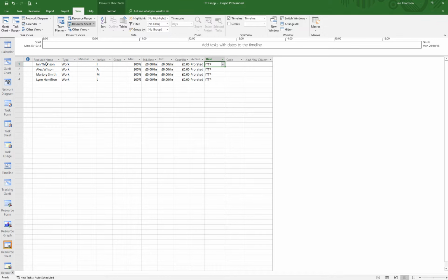Like myself, Ian Thompson, I'm expected to work the 9 till 5 and the 9 until 4, but I'm maybe taking an extra holiday that everybody else isn't. The site's got a Christmas holiday, but I've booked myself a long weekend in November, so I'm going to have a Friday and a Monday off. Now, obviously, I'm not available then to give some effort, so I need to reflect that in my calendar.